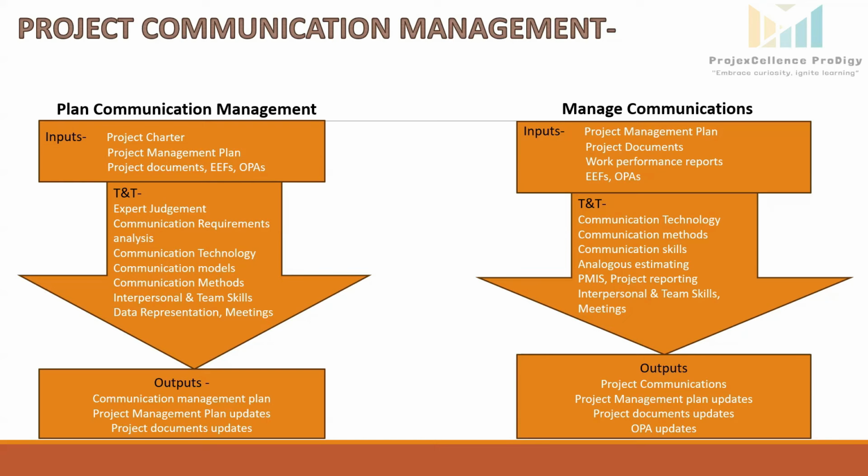Quality reports share quality-related concerns and corrective actions. Risk report informs stakeholders about project risks and risk mitigation plans. Stakeholder register identifies who needs what type of information. Work performance reports provide status updates and performance metrics like progress reports and earned value analysis, and keep stakeholders informed.